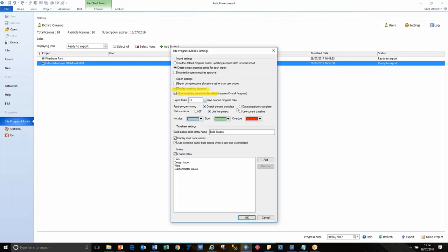And also I'm making a decision whether I should use a duration percent complete or an overall percent. And we always recommend the overall percent because you can change the remaining duration. It doesn't affect the duration, etc. And there's a color coding system that you can use.